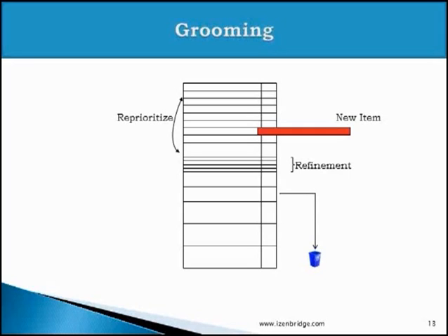And deletion. A lot of the time we keep getting a good number of wish list items in our product backlog, but continuously a product owner should also lean the product backlog. So he should look for opportunities to delete some of the product backlog items which are not adding the desired value to the product. So all this falls under product backlog grooming.